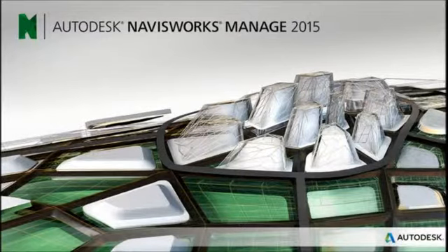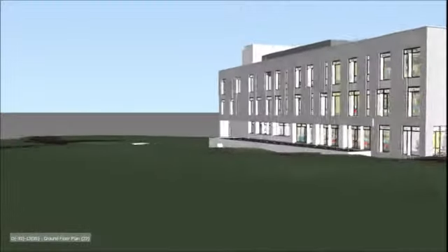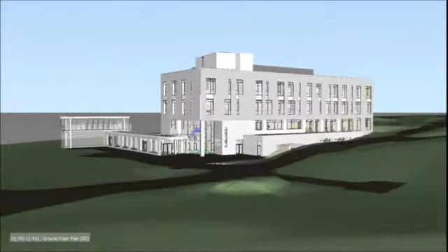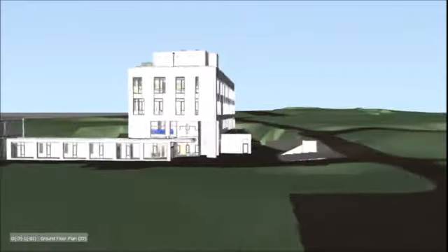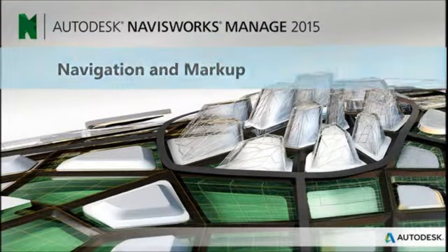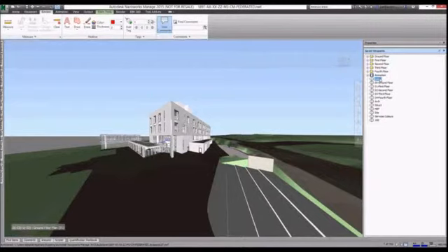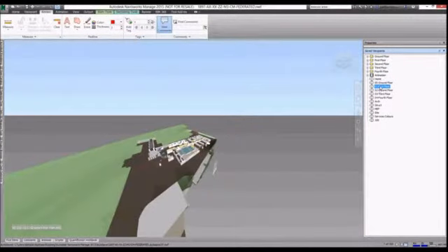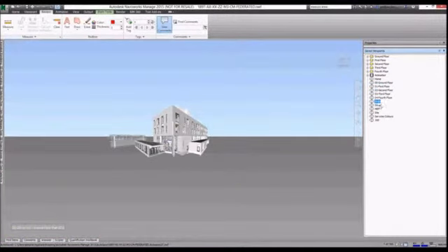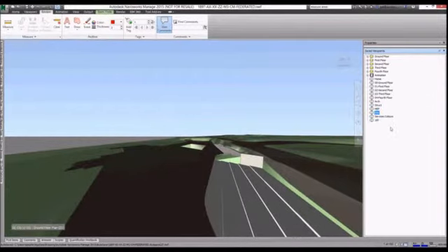We are also sharing a Navisworks NWD file, and although this can be viewed in a free version of the Navisworks software, Navisworks Freedom, we recommend the full version, Navisworks Manage, to get the most benefit from this. In addition to most of the uses possible in Designer View, Navisworks Manage provides the additional ability to use clash detection tools, to add the timeline to the project and simulate the construction sequence, and quantification tools to measure and take off elements in the model.